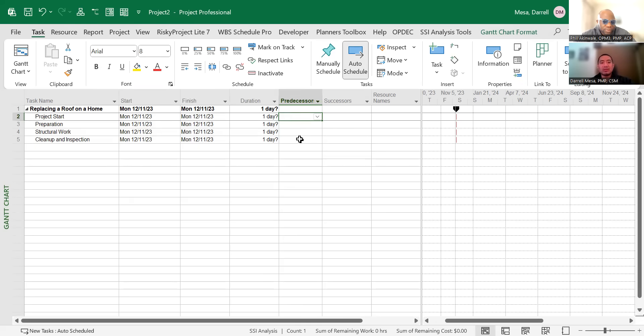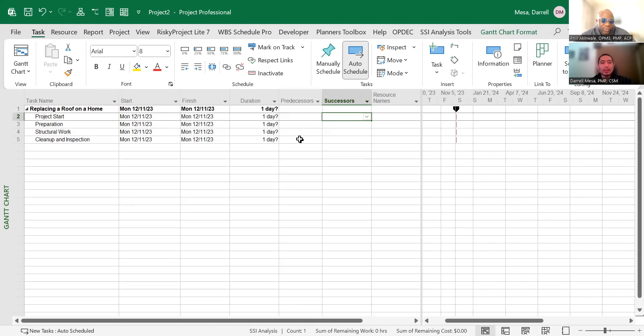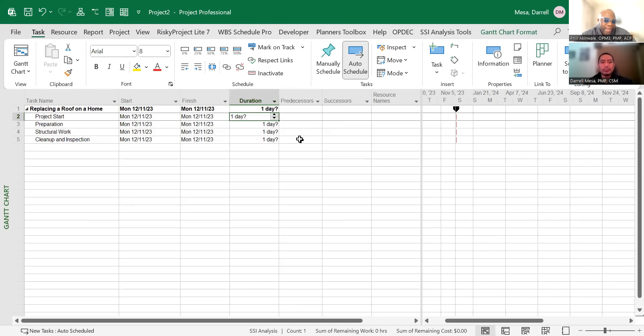This is automatically calculated by the number of duration days and the dependencies for linking each task together. So for project start, that's kind of like a mobilization. It's not just a start date, it's like all the activities that we need to do before we start the effort. Ed, how many days would you say the project start would have, the whole prep and making sure we got all the equipment on site and all that stuff? About three days.